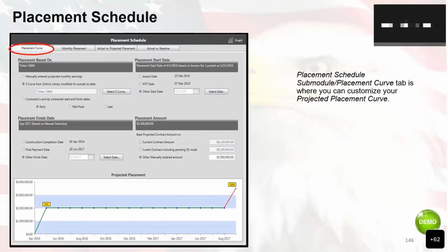All right, next up is the placement schedule. The project schedule, being a management control tool, may be applied to many aspects of work by the U.S. Army Corps of Engineers. Project schedules can be utilized by management for in-house analysis, such as engineering and design and life cycle project management. An example is forecasting annual office budgets by analyzing projected placement from early finish and late finish, where costs have been assigned to those particular activities.